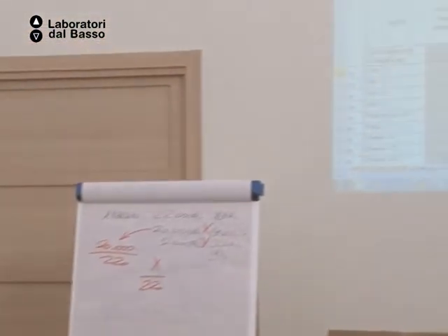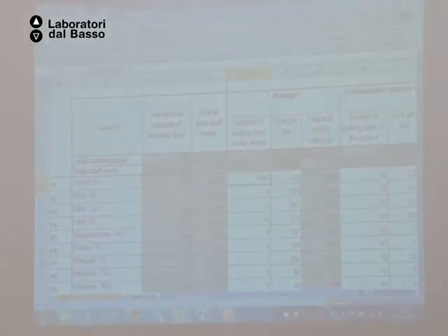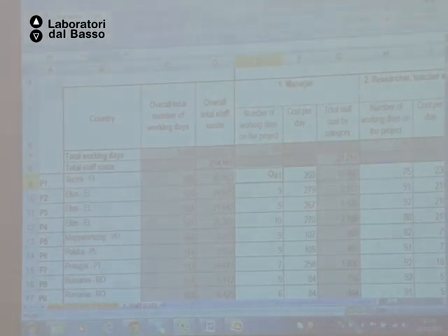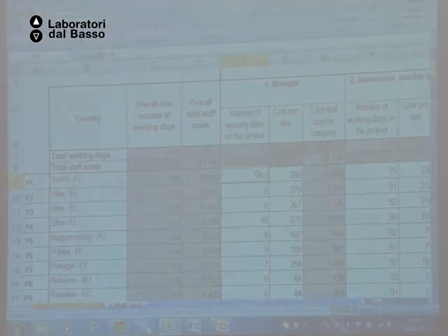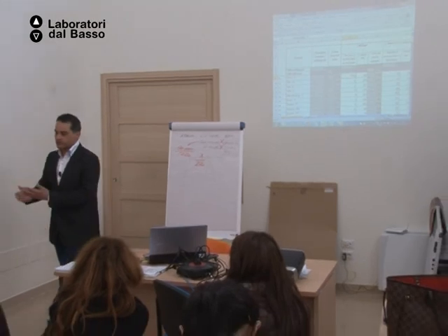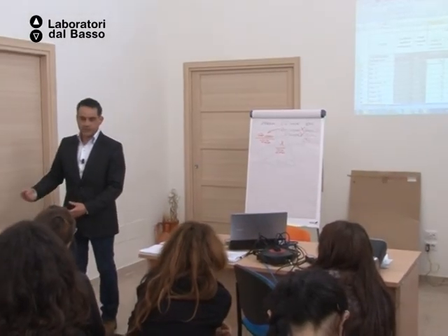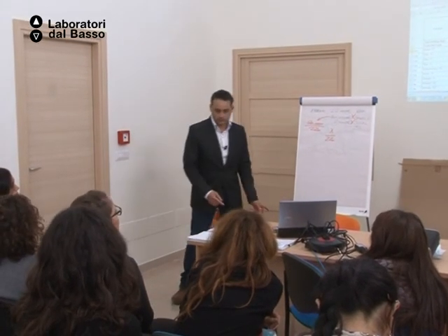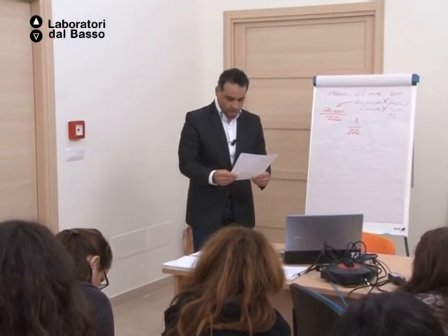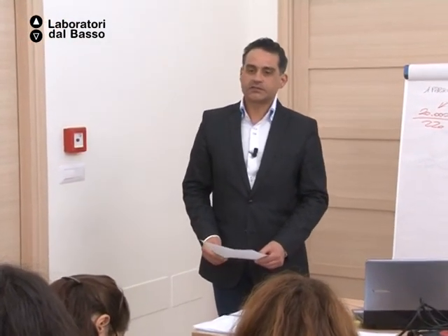What to say here? For example, all that I'm saying is part of the guides. If you have two or more staff of the same category, for example in my organization, I am manager and Yonida is also manager, and we will be managing the two, so we make an average of our salary and we put it there. Well, if you have a staff member whose position or function is not considered here, you'll have to pick the one that is as close as possible to the definition, to the category.